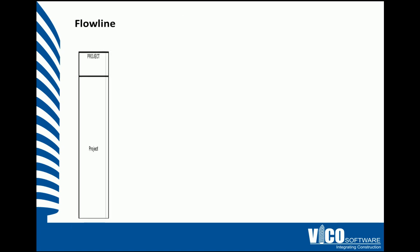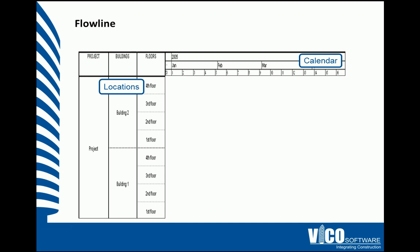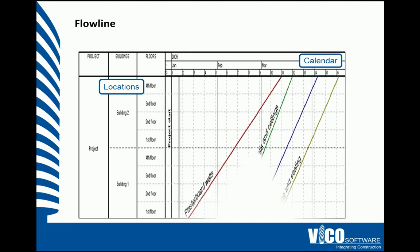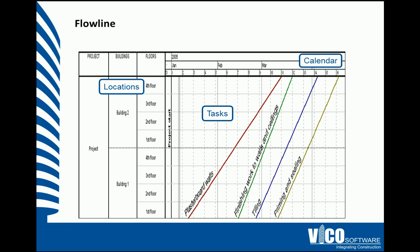Flowline schedules consist of a location breakdown structure in the vertical axis, and a calendar in the upper horizontal axis. Within our schedule view, we have a series of sloping lines, which are representations of our tasks.